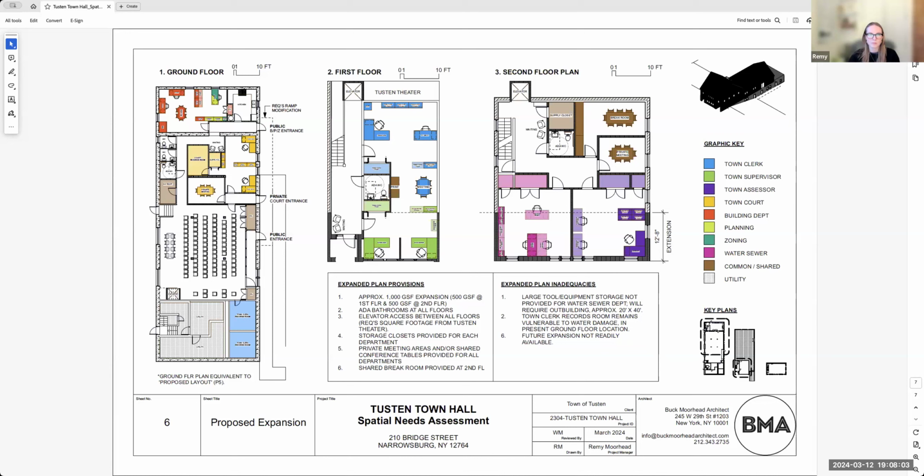But I think it definitely would be wise to do an existing condition report, or update that, just making sure that structurally the brick and the roof are sound. We could do probes if necessary, to check out the system, to make sure that you don't tear it off and all of a sudden there's a big unknown. That's obviously the worst thing in the world of change orders in a project, and you'd want to know before investing in the building.